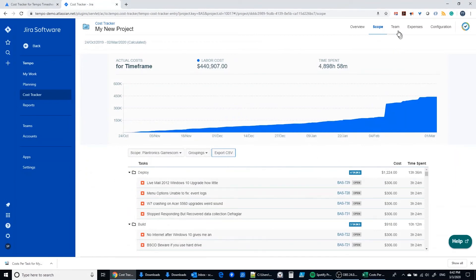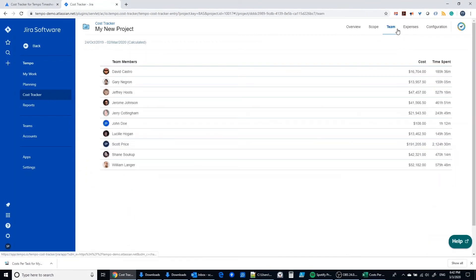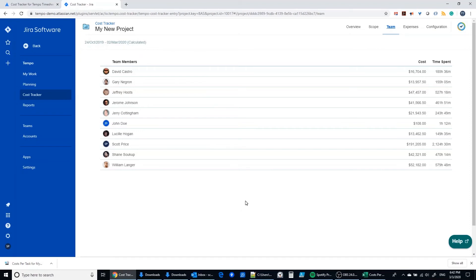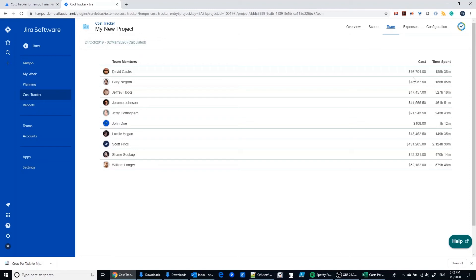The next thing we want to look at is the team section. So in this team section we have the folks that are going to be working on this project based on them being assigned to issues in the project. And so everyone right now has a cost that's added up for the work that they've done based off of the default rate that we built in the configuration section. So we know how much each employee is costing us and how much time they're spending on this particular project.